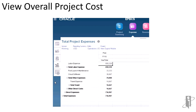In my case, I entered some travel, it calculated my labor for me, there's my cloud software. We've determined that based on a total of $60,000 in cloud software implementation costs, $36,667 of that is in this year. One third of the post-launch maintenance ends up being in this year, giving me a 2016 expense for this project of roughly $736,000.